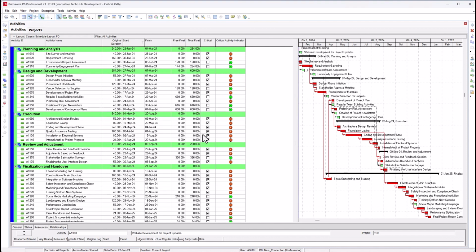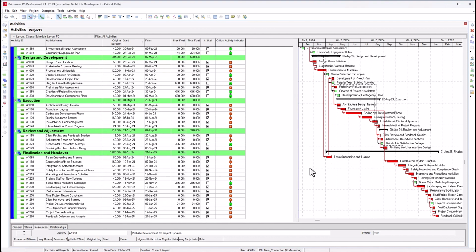Okay, so you can close. As you can see here, even without looking at the Gantt area, you can tell the activity. It's quite obvious compared to this small box that is not too obvious. It's quite obvious which activities are red and which ones are green. So you can actually use this to identify your critical path. If you want, you can also group and sort your activities based on critical and non-critical.